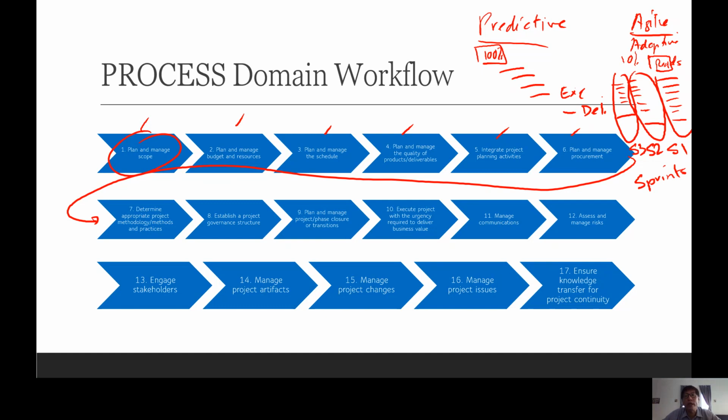In time frames of 3 weeks or 4 weeks, for example. So whatever requirements or tasks need to be performed in that sprint, we deliver that first. If you cannot finish the task, we dump it to the next sprint. That means there are some backlogs there. So this is the ideology or methodology of how agile or adaptive project management works.